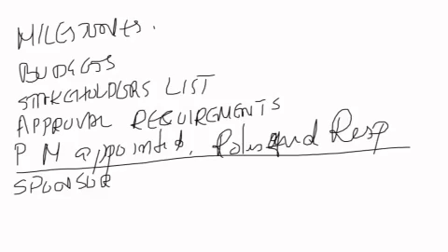So here the key points are: the project charter is done during initiation. It's done by the sponsor. Any changes must be reapproved by the sponsor, and through the project charter, the sponsor appoints the project manager.